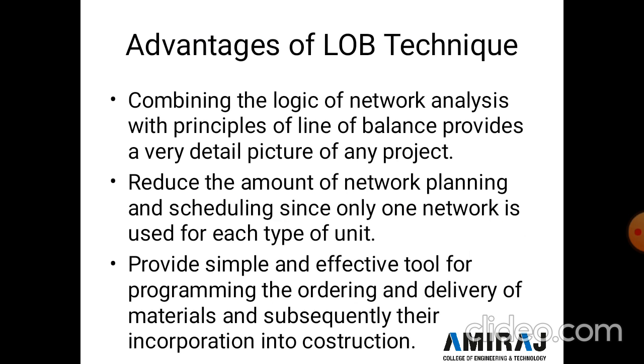Now the advantages of LOB. Combining the logic of network analysis with the principle of line of balance provides a very detailed picture of any project, and reduces the amount of network planning and scheduling, since only one network is used for each type of unit. It also provides a simple and effective tool for programming the ordering and delivery of materials, and subsequently their incorporation into construction.